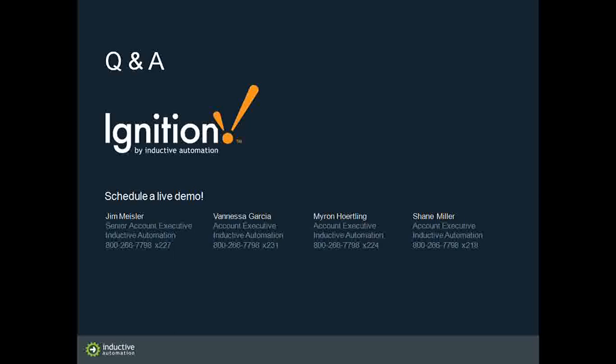Great. Bill, your thoughts on that? Yeah, I would agree with Tom. We had an old system at Diamond, and we chose to phase it out. So for a while, we just ran parallel systems. Over time, we incorporated those features into our Ignition product, and we slowly and gradually phased the old system out. We found that the integration with Ignition is very simple.